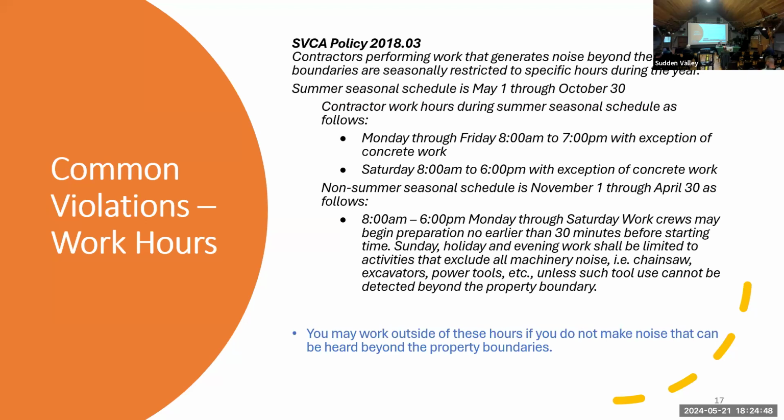Now, I mentioned concrete work. We understand that it's hard to schedule a concrete delivery. And so, although we ask that you try and schedule it within the normal working hours, if that is not possible, there are exceptions. And in the busy season, which is here May 1st through October 30th, Monday through Friday, you can start mobilizing at 6:30 to start pouring at 7. But you have to call and let us know that that's what's happening. And you should already be notifying us because you're probably going to have a road closure.